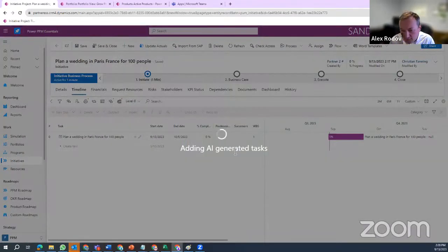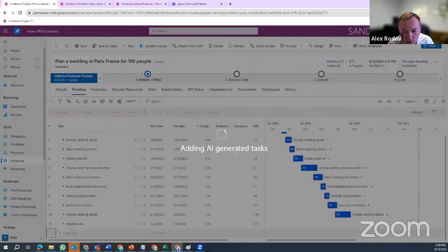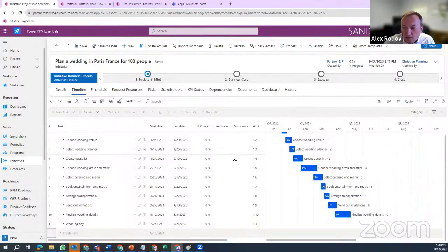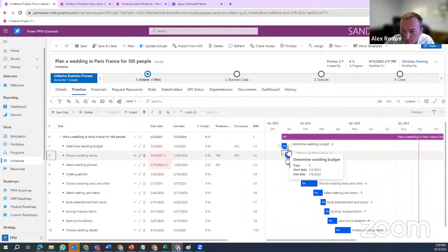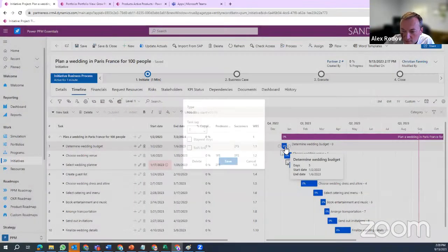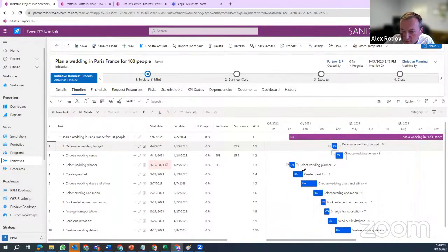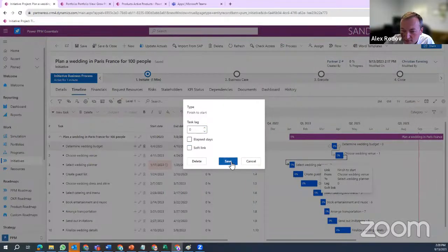And that would not just build the schedule, put the sequence more or less in place, right? And hopefully it would put everything starting in July of 2024. Oh, it didn't. It didn't. It did. It's finishing in July of 2024. Well, it's starting this year. So what we can do going forward is link everything from here, make them all hard links, and then start pushing everything on a timeline based on these links, right? But at least we're not starting from scratch.